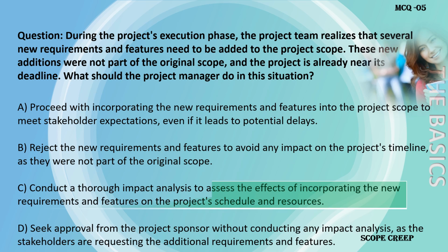Answer for question number 5 is C. Conduct a thorough impact analysis to assess the effect of incorporating the new requirements and features on the project schedule and resources. Explanation. In this situation, the most appropriate action for the project manager is to conduct a thorough impact analysis to assess how incorporating the new requirements and features will affect the project schedule and resources. This analysis will provide insights into the potential consequences of adding scope at this late stage of the project.